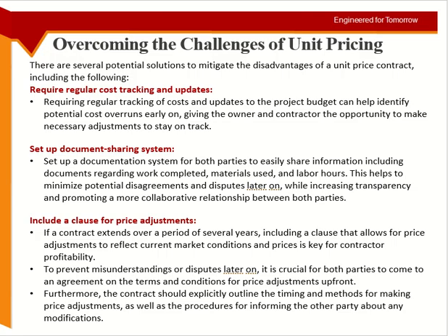Okay, so how can we deal with the problems which we have just listed down? So the first thing is you do regular cost tracking, okay, to know what is your actual cost per unit. The cost you have quoted, you quoted before the project, right? But in the actual project it can go up and down. Okay, so you do regular cost tracking. You try to identify any cost overruns earlier. Okay, something which you assumed will cost less, but now it is costing more.